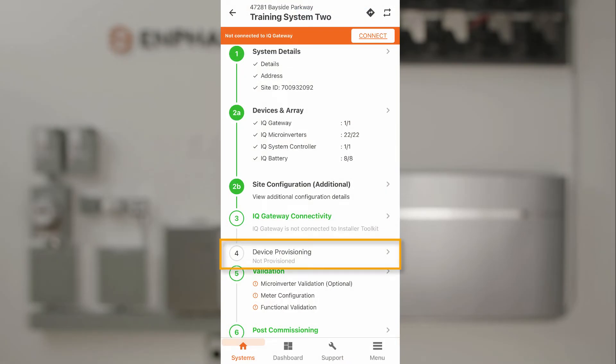Provisioning takes all of the information from the installer app on the phone and programs the IQ Gateway to manage, monitor, and operate the system.